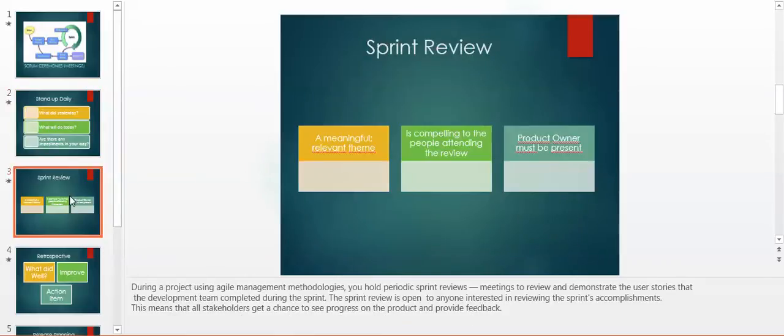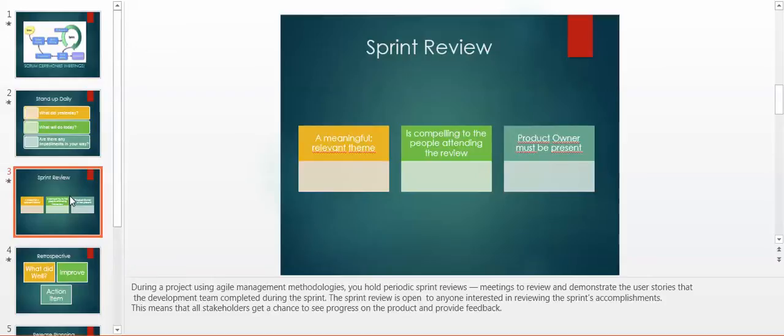Following, we continue with sprint review or demo. During a project using agile management methodologies, you hold periodic sprint reviews, meetings to review and demonstrate user stories the development team completed during the sprint.